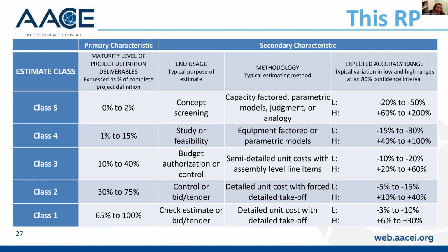Depending on the technical and project deliverables or other variables and the risks associated with each estimate, the range for a particular estimate is expected to fall within the accuracy ranges identified here. However, this does not preclude that the actual project result may fall inside or outside those indicated ranges.